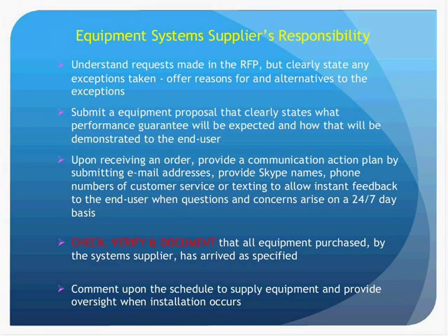The selected supplier must check, verify, and document that all items purchased by the system supplier have been properly ordered and have arrived at their own assembly area as specified by that supplier. Next slide, please.